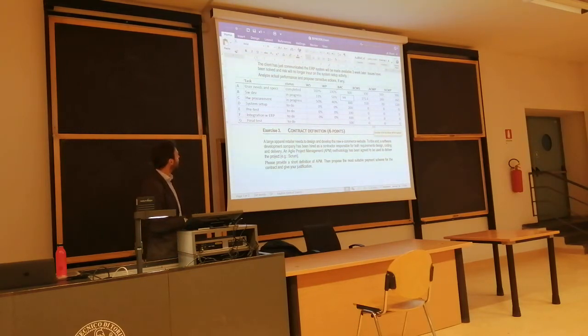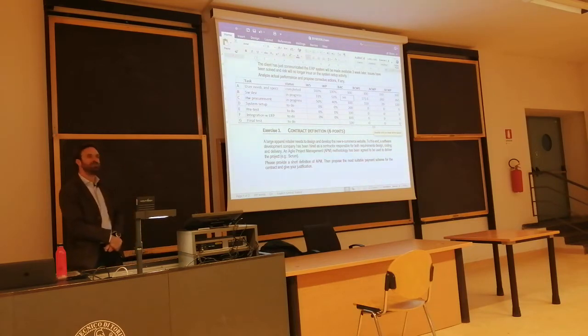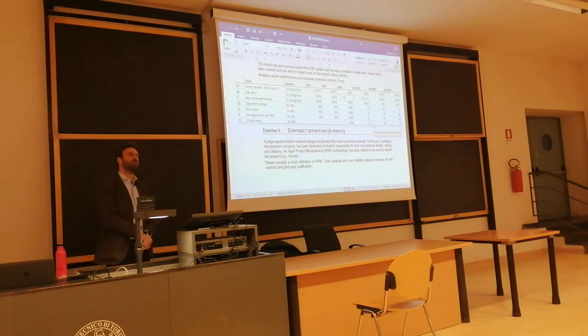Same resources or not? Well, pre-test and test, it's the same, but pre-test and test are future tasks. Integration with ERP's software development, which is the same as what we do. Hardware procurement is different. What do we do? There's no wrong solution here. We don't have enough information. Just make a decision and either you go with a revised approach or an original approach. Let's go with the revised approach. We think that past cost performance will also apply to the future. If this is the case, you need to calculate an average cost index and apply the average cost index to completion.